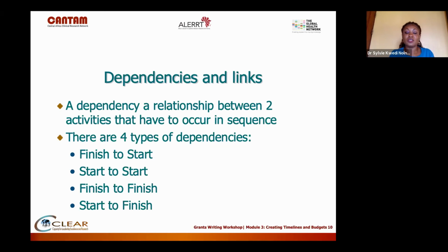So task A, contract signing, started, and funding was given. It needs to start so that funding can be given, and that first funding can be received, and so that task B is finished, even though task A has not finished, but it needed to start.